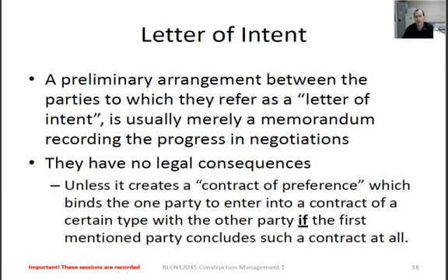Typically, the only thing outstanding is the signatures of the signatories, because there might be a delay getting all the same people in the same room to get the contract signed or something like that. But that would actually allow contractors to get started on site and execute the jobs.